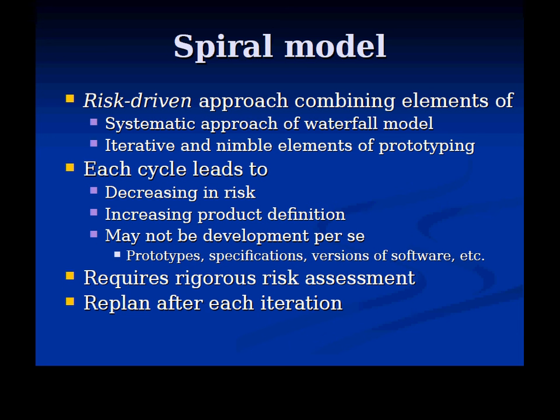With the waterfall model, one of the big things that can happen is the big bang. Oh, it's great. It's great. Okay, so you have many people working on these things. We're going to put these together in a couple months' time, and it'll be great. And often when you put them together, that's when things start going really bad. Perfectly reasonable assumptions made by X and Y, but they don't work together. They don't play together well.